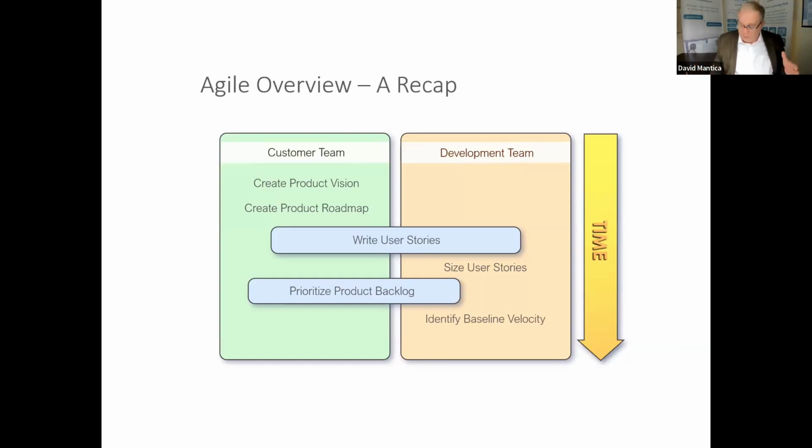So how many user stories? Velocity is basically how many user stories that team can produce in a given time box. And then you have your release plan based on what your velocity looks like. This is where the project management comes in: understanding story points, measuring story point function, tying it back to what your baselines are, so you can build a release plan out, always knowing it's about effort, not time.